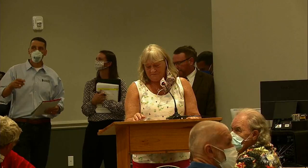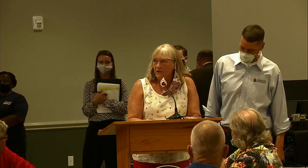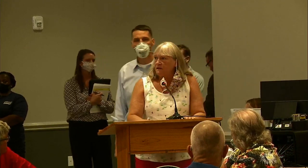And what is your schedule on building? Well, first of all, it's got to pass all the legality issues. And Hanover, when can you start building? We can start building on phase 1. And that's the section that backs up to 48, correct? So we can, Ben Snyder, Hanover Land Company, we can start development on phase 1 as soon as the construction plans are approved, which is the step after this step.